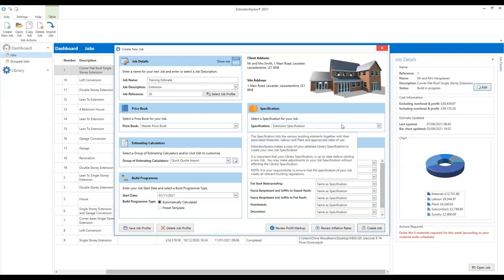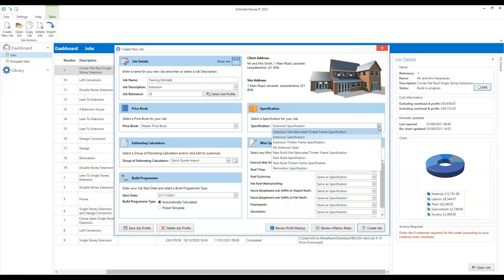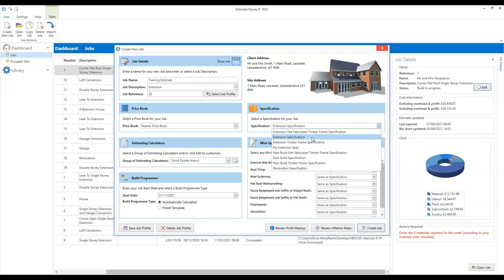The final thing we need to think about is our specification. In the dropdown box, you'll see a number of different specifications for different types of work. You'll see we've got three extension specifications — two are for timber frame construction and one is a standard brick and block extension specification, which we're going to use. You'll see we've also got a number of new build specifications. The extension specifications have a couple of key differences from the new build spec. Firstly, they use plant appropriate for where space is limited — specifying a mini digger rather than a JCB for example.